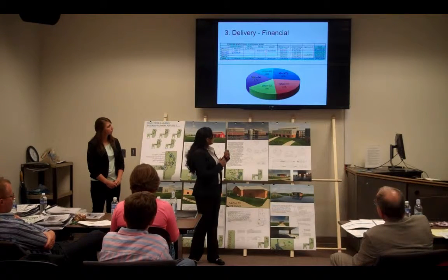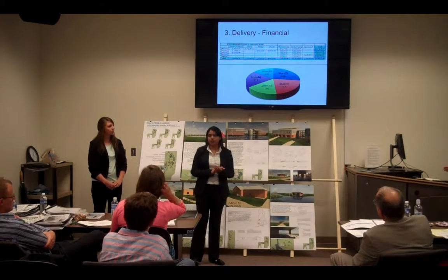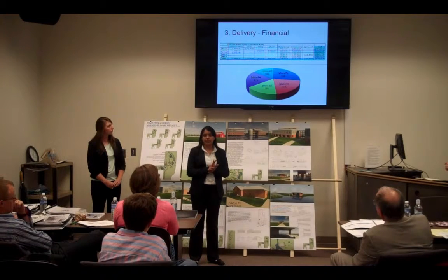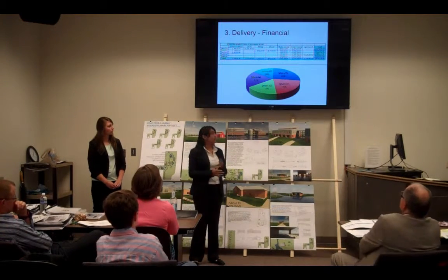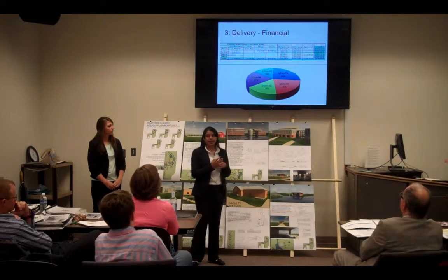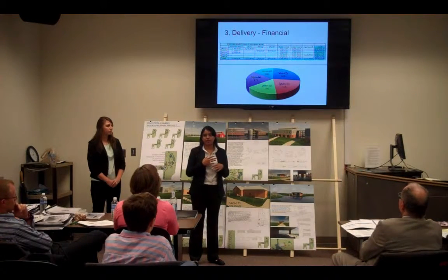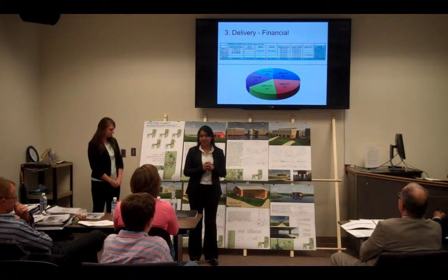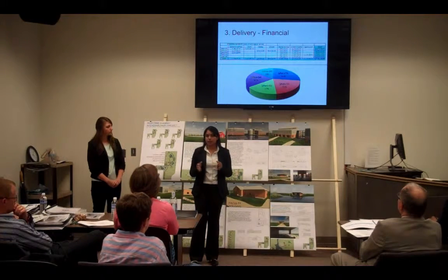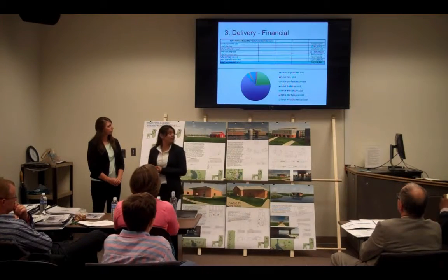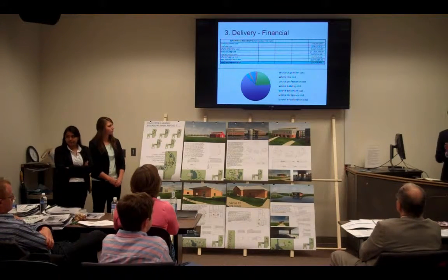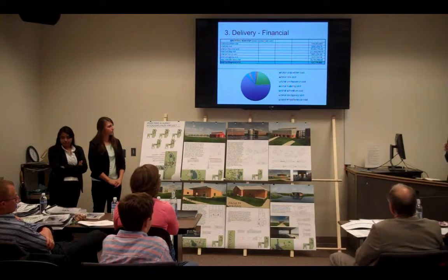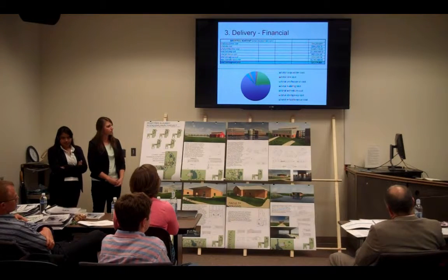And coming to the financials part, the total construction cost is $17.3 million, among which the huge part is the academy building, roughly about $4 million. That's been spread in 3 phases, and the overall cost is also spread equally among all the 5 phases, so that there's no pressure in one phase. Okay, the total development cost comes to $27,779,000, with the majority of that being due to the high building cost.